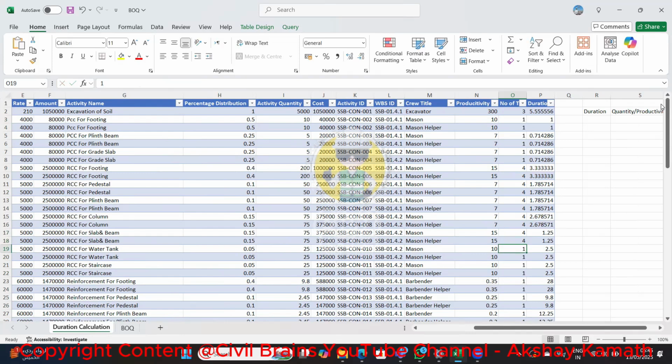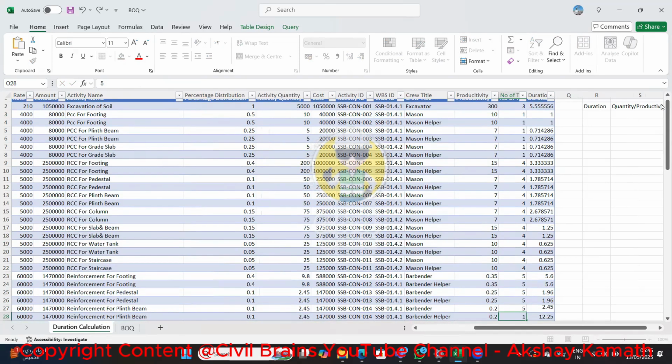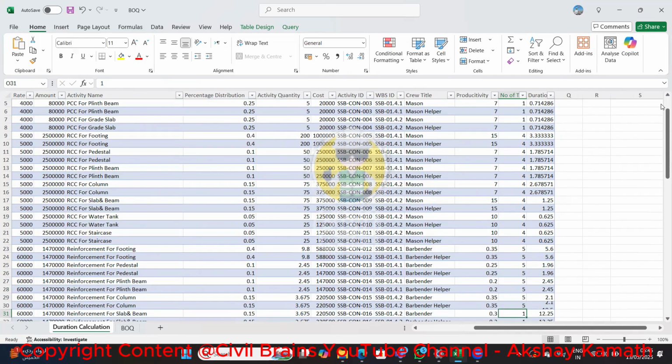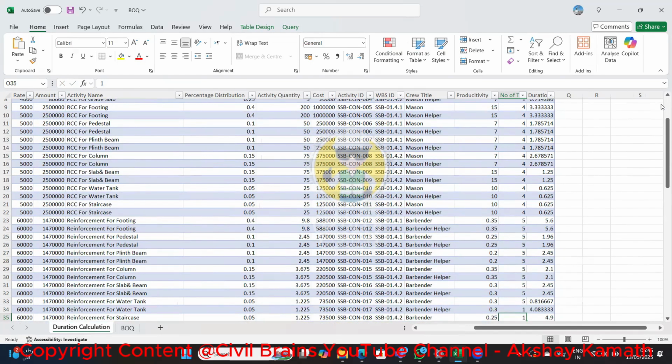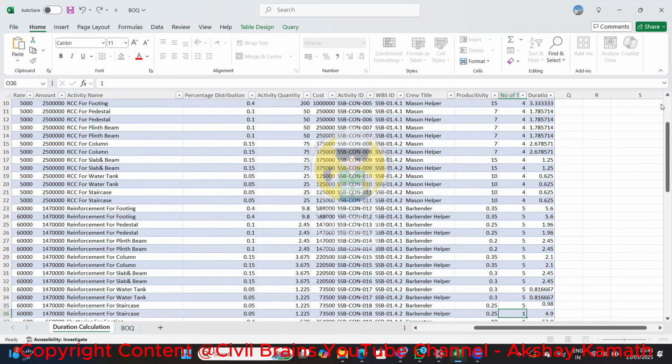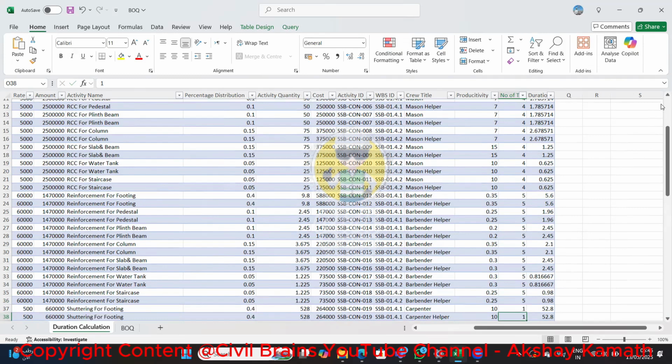Next, if you come to the RCC slab, here also I am doing that. Four teams I'm putting. The tank also, 4 teams. The staircase also, 4 teams. And for reinforcement, it is taking 28 days. No, I don't have that time to close this, so I'm considering 5 teams to close this activity. Everywhere I'm considering 5 teams, so 5 teams commonly in the project will take care of all my reinforcement work. I'm not going to increase or decrease.